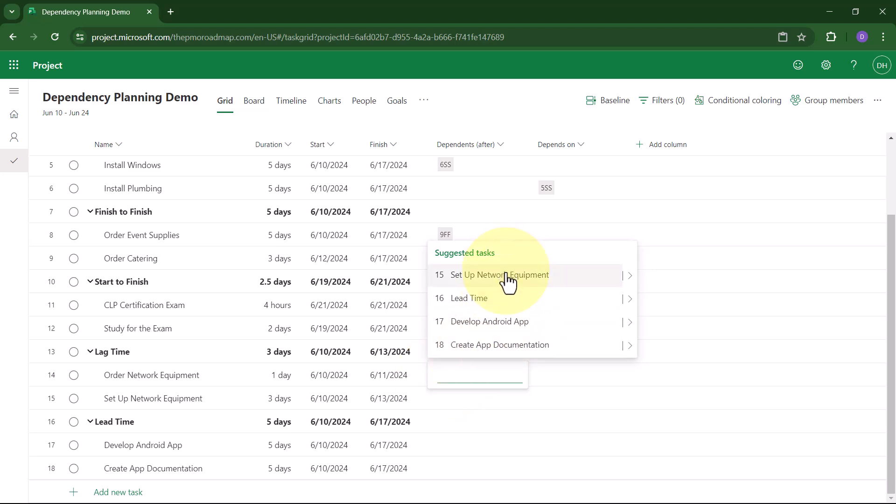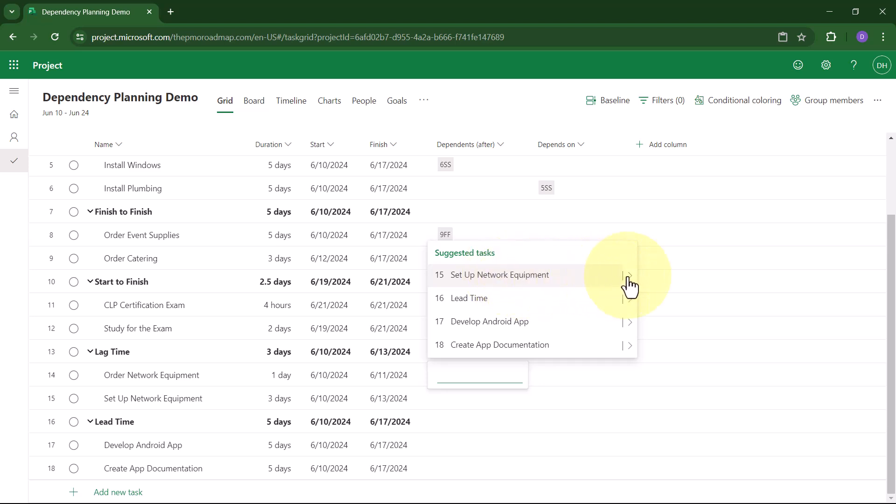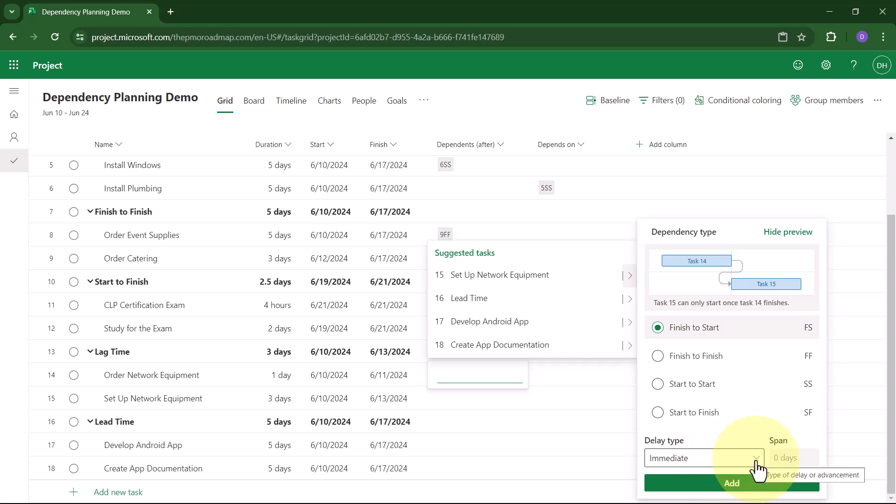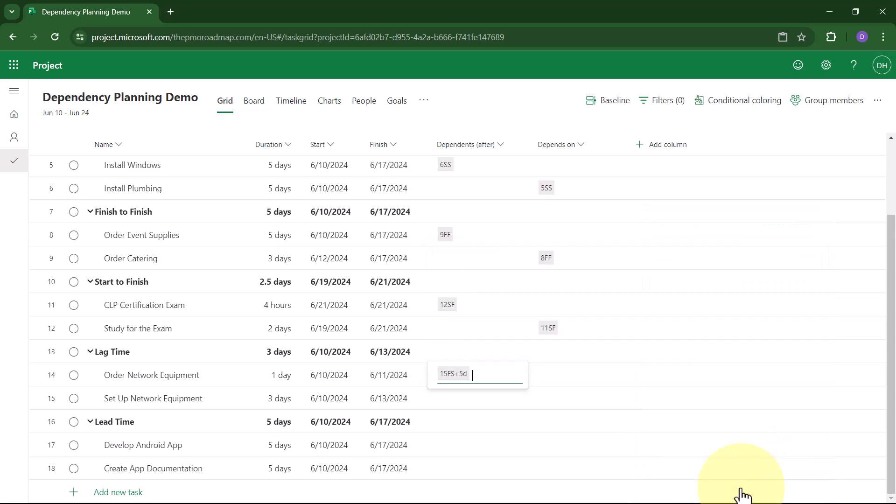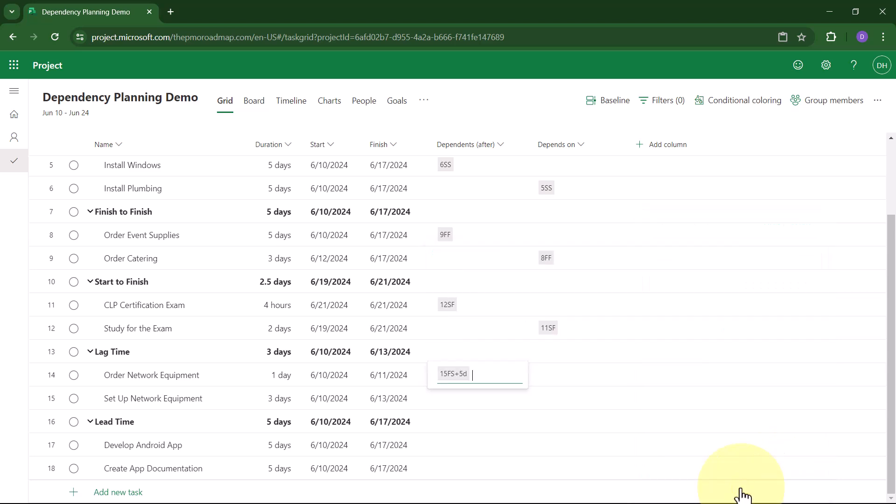Click anywhere in the Dependents After field. Then choose the dependent task. In this case, Setup Network Equipment. I'll choose the Flyout button. In the dependency type, I'll leave it set to finish-to-start. But down at the bottom, here's a Delay Type field. When you click that field, you have the option to set lag time, called Lag By, or Lead Time, called Lead By. I'll select Lag By, and I'll put in a span or duration of five days. When I click the Add button, Project for the Web creates a finish-to-start dependency with five days of lag time.